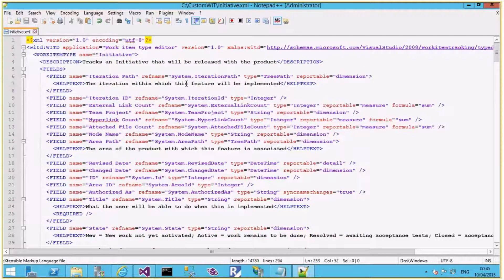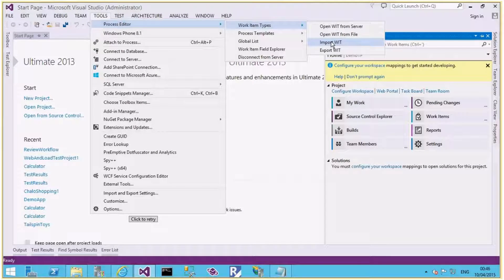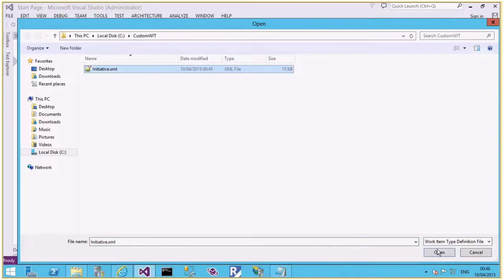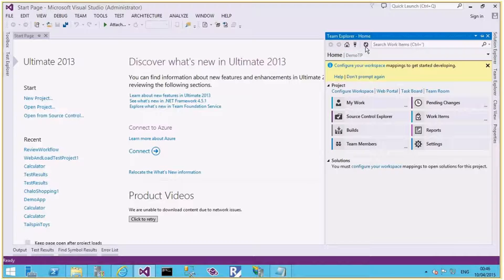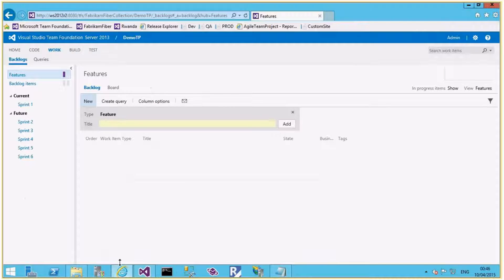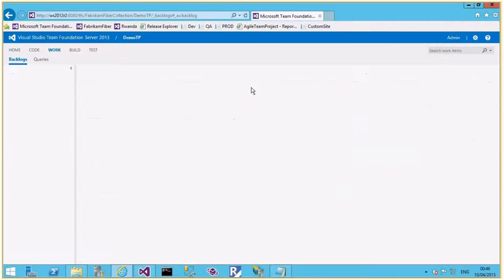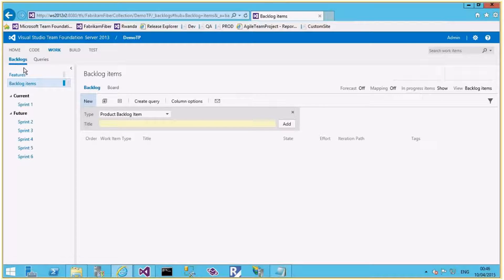Those are the changes: I've changed the work item type name to Initiative and updated the Implementation tab to include Feature instead of Product Backlog Item. Now let's import this to Demo TP. I'll go to Tools > Process Editor > Work Item Types > Import, select Demo TP, browse to initiative.xml, and import it. The work item is imported — you can see the Initiative work item is now available. However, if I go to the Backlog page I will not be able to see it yet. I have to also change the Categories and Process Config files.